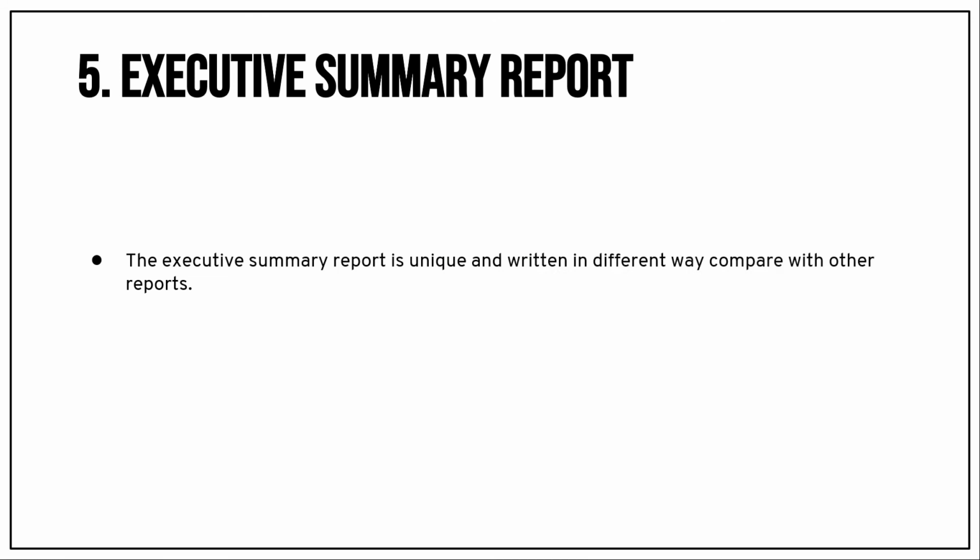So what is the executive summary report? The executive summary report is unique and written in a different way compared with other reports. We can say executive summary is the report which we will provide to the higher management and the sponsor actually. This will be the conclusion of whatever we discussed earlier, because the higher management will not have time to go through the granular level of the project status. So they want to see the overall project status, whether it's green, amber or red.